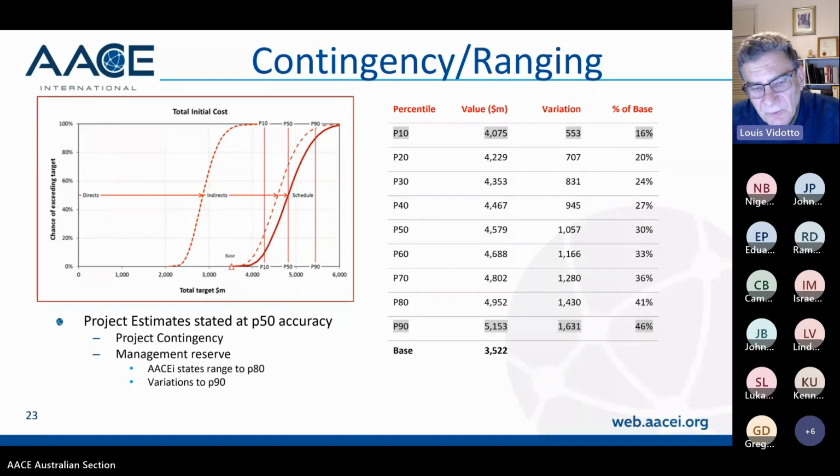There's another table that I haven't put in here, and it looks at what level of deliverables you need for each stage of an estimate, or each stage of a project. Geotech's certainly one where it says at pre-feasibility, it's really historical data. Maybe for feasibility studies, you've done a bunch of drilling, but they talk about preliminary, conceptual, and final. But then the definitions of those are what matter. If you can get it right, that's what John does in his model, which is a great definition.